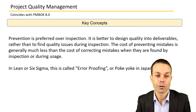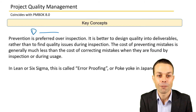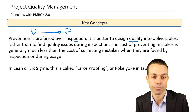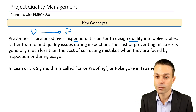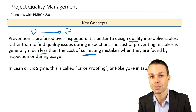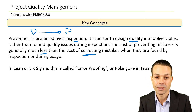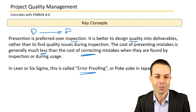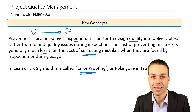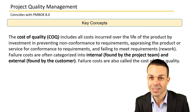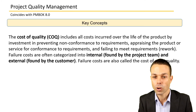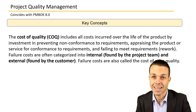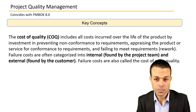Prevention: we want to prevent defects rather than find them, so prevention is preferred over inspection always. It's better to design quality into the deliverables rather than find quality issues later on. The cost of preventing is also usually less than the cost of correcting mistakes once found. In lean or six sigma, this is also called error proofing, or poka-yoke in Japanese — building in that quality and error proofing into the process or deliverable you're working on. Cost of quality includes all costs incurred over the life of the product by investment in preventing non-conformance.